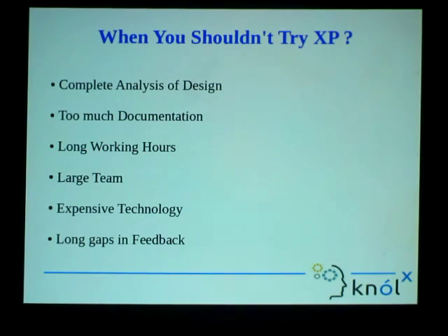Then long working hours. If they have long working hours, then you can definitely not try XP at all because it requires a lot of work in just a small time frame. Then large team. If you have a team of 100 people or 500 people, then you definitely cannot adopt XP at all. You cannot do pair programming, you cannot have collective ownership of the product. So that's why we should not adopt XP.